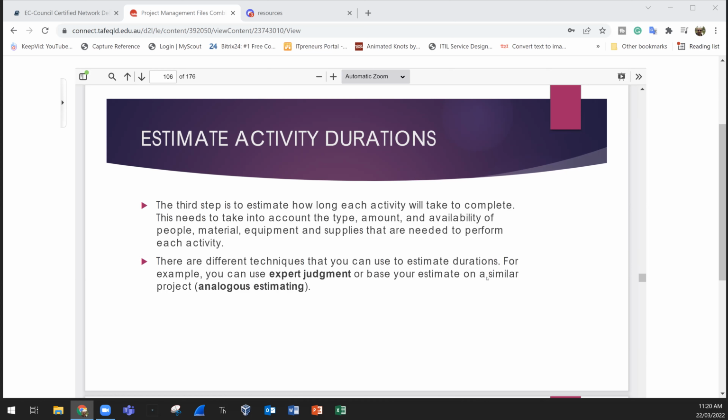You don't deduct the 3 minus 1, because the first day of April is calculated. So when I tell you the task will start on the 1st and finish on the 3rd, the total duration here is 3 days, because we calculate the first day and last day, of course.